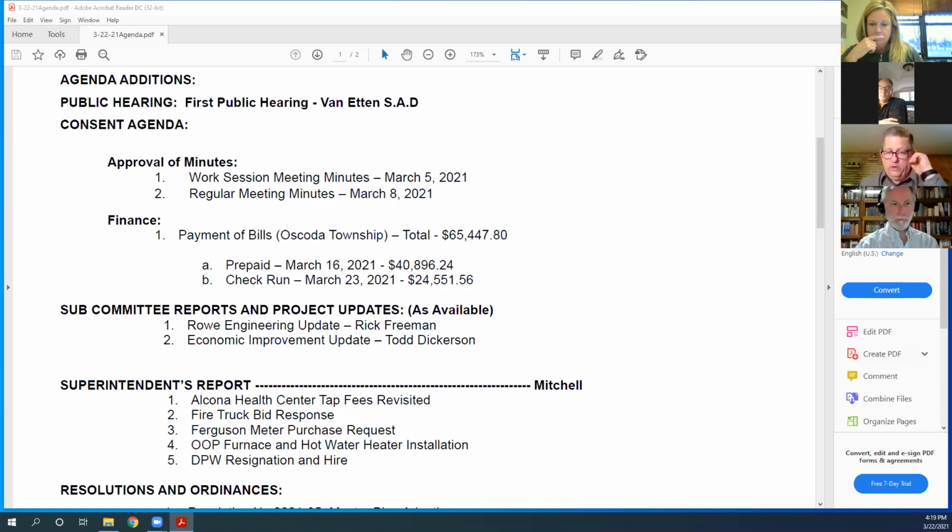We're keeping an eye on it, but a lot of people might have already heard there seems to be a shortage of materials out there right now. So we're going to watch to see exactly when things would start coming in, and when we would start seeing physical work in the field. That project will be spread over the rest of 2021, 2022, with some final cleanup items maybe in early 2023. Again, it depends on how quickly they can get some of the material ordered and delivered to the site.